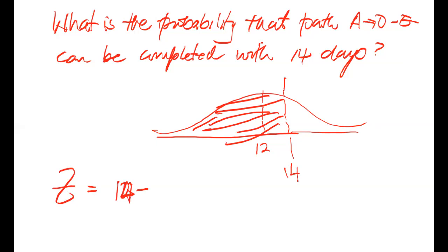The Z value is found by taking the requested completion time, or the ask-about completion time, which is 14 in this instance. You take the ask-about completion time, which is 14, minus the expected completion time, which is a calculated time from the network, which is 12, and you divide it by the standard deviation of the project. So the Z value in symbolic form is usually the